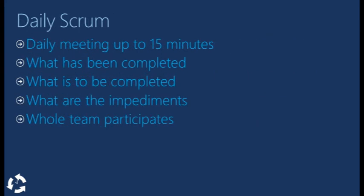The daily Scrum is a short 15-minute meeting when the team discusses what was done in the previous day, what will be done today, and whether there are any impediments that need resolution. The whole team participates in this meeting.